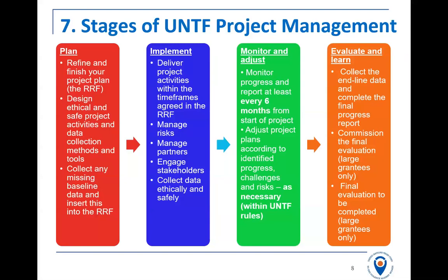So by the end of November, we expect you to have finalized that plan and designed your data collection methods as best as possible. And then within 6 months, we ask you to collect your baseline data. And this is all in the guidance we'll give you.